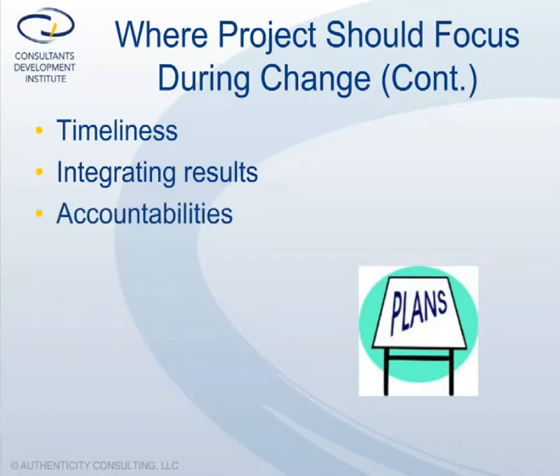Focus on accountabilities. In project plans, include specific deliverables to be produced by your client during the project. If a deliverable is not produced when it's scheduled, then immediately discuss the situation with your client. Experienced consultants realize that it is their client who must continue to do the work if a project is to be successful. The moment that a client backs off from doing that work, the consultant and client need to have an authentic discussion about the situation.